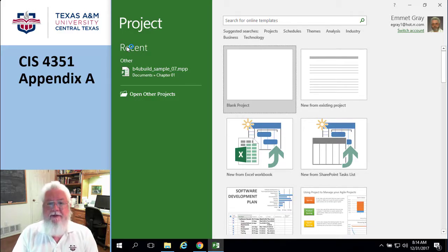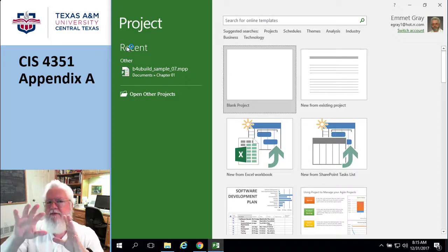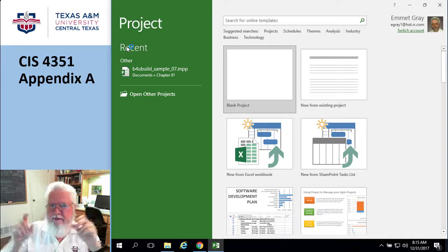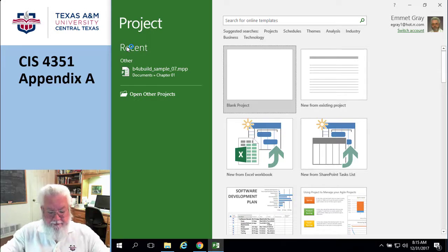Then assigning resources. You could go down to an individual. You could say, Bob is going to do this. He's going to be attached to these tasks. Most people don't do it that way. They do it by teams. So they'll say, like, the electrical team, I need 72 hours of electrical labor for this construction job. Okay, and not by name, but just electrical skill. Okay. So those are those fundamental concepts.